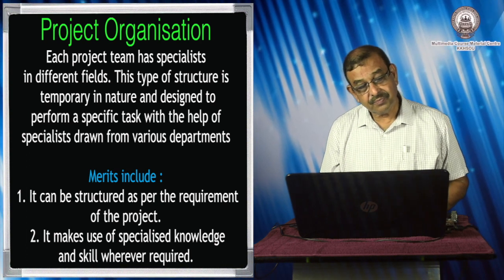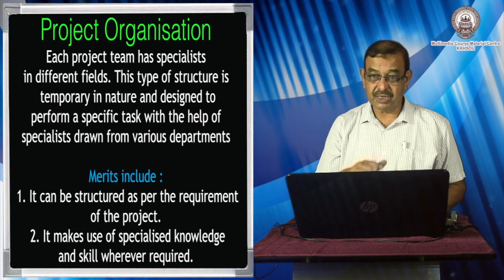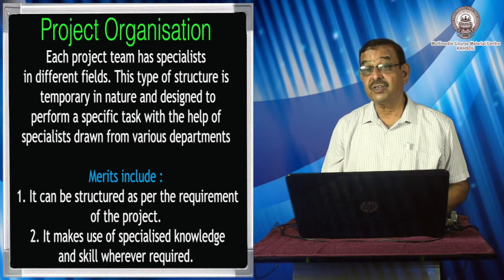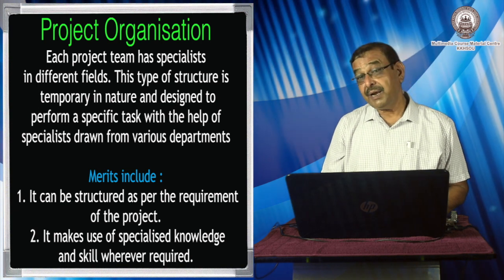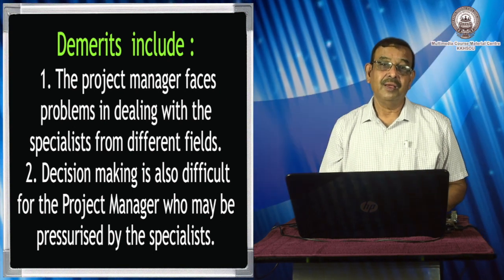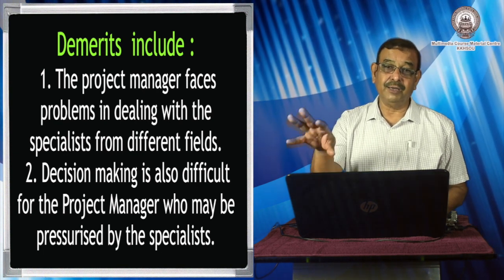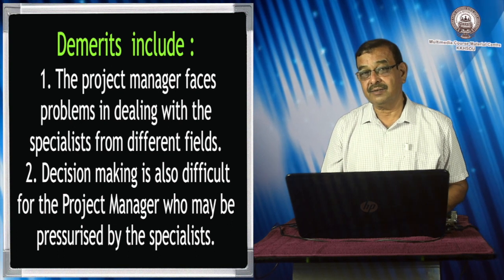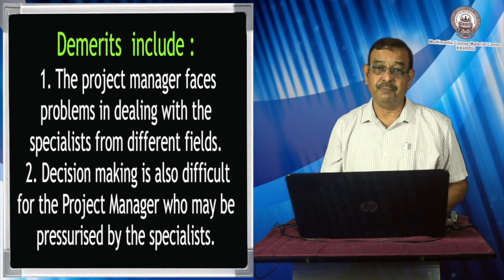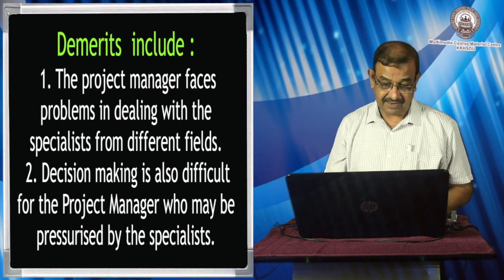The merits of project organization: it can be structured as per the requirement of the project — if a project is very large, more people can be deployed; if small, fewer people are needed. It makes use of specialized knowledge and skill wherever required. However, as a demerit, the project manager faces problems dealing with specialists from different fields. For example, if the project manager is a chemical engineer and there is an electrical engineer under him, the chemical engineer might find it difficult to coordinate the electrical engineer's activities.